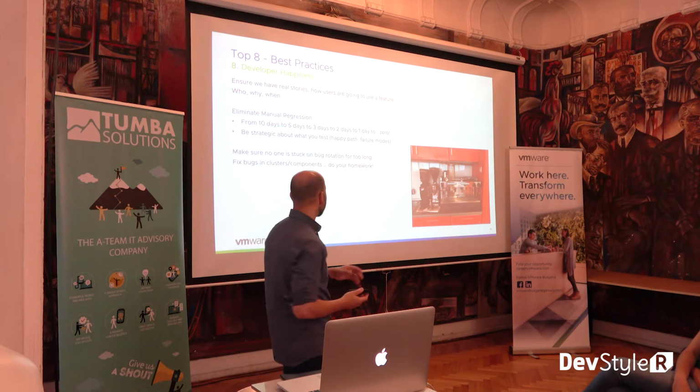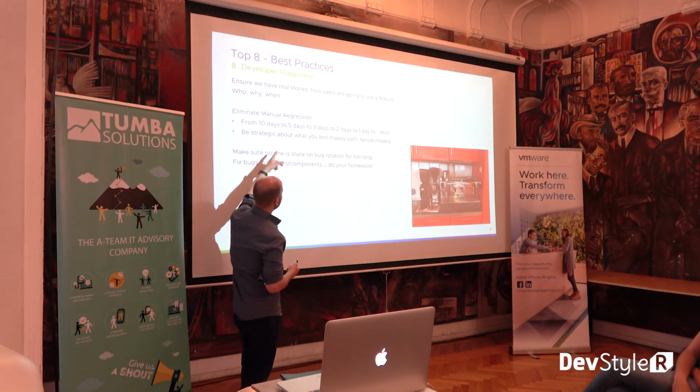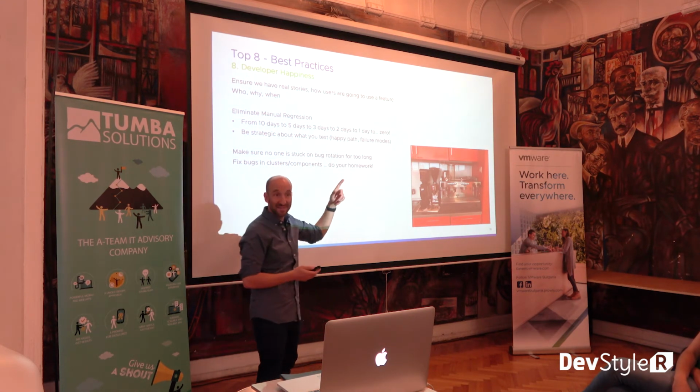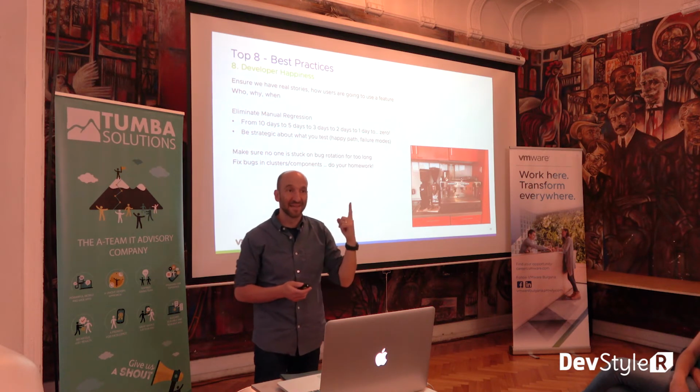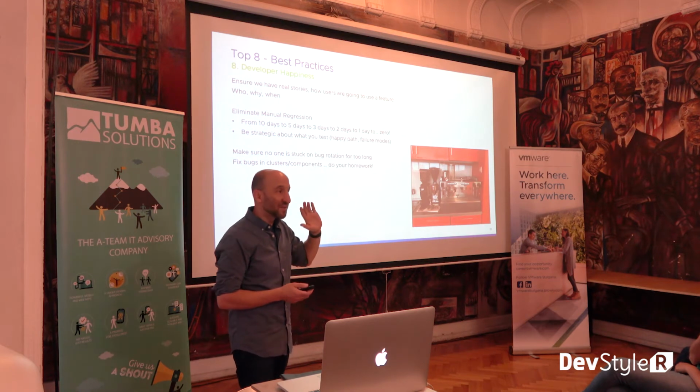And so pretty quick, we started out with about 10 days last year for manual regression. Went to 5 days pretty quick in the beginning of this year. Then went to 3 days, 2 days, and now I can say, as of this last release that we shipped yesterday, 1 day. And it wasn't even a full day. So in the next 2 months, we'll get it to 0. So we're not doing any manual regression.